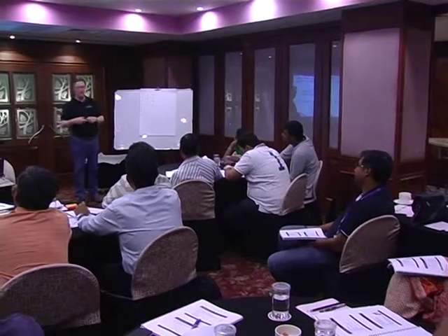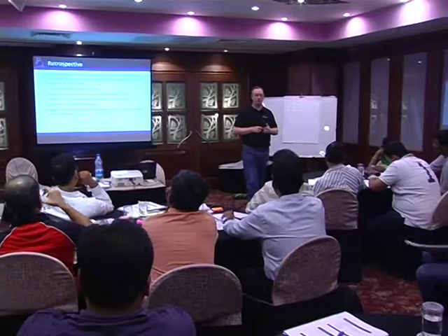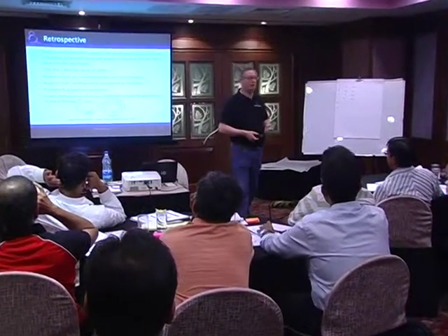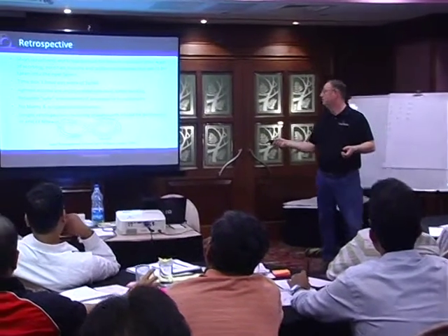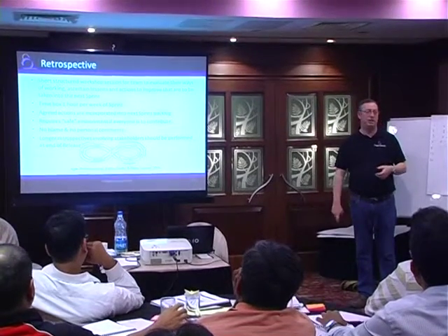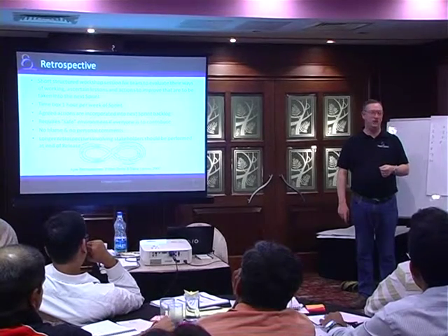Time box to an hour per week of sprint. Again, to me that's a guideline. This is about getting feedback, this is about learning, this is about improving. You don't stop just as an hour runs out. Esther Derby and Diana Larsen have written the seminal work on retrospectives. It's called, surprisingly, Agile Retrospectives, with a secondary title, Making Good Teams Great.